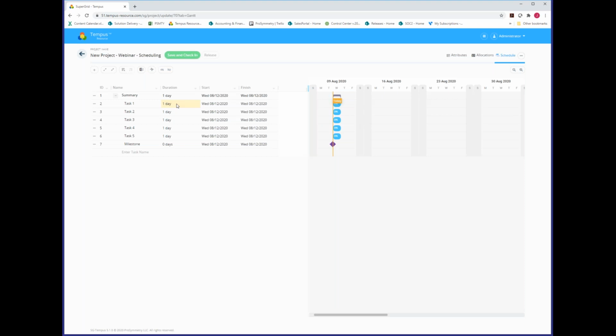I'll circle back to that in a moment, but essentially the 3 variables that are used in that scheduling process are going to be duration, work, and then percentage, essentially percentage allocation of the resource or resources that are assigned to that particular task. All right, so that same type of functionality is maintained in Tempus as well. So again, it'll be a very familiar experience for those of you that have worked in those types of tools before. But in this case, what I'll do is update durations.